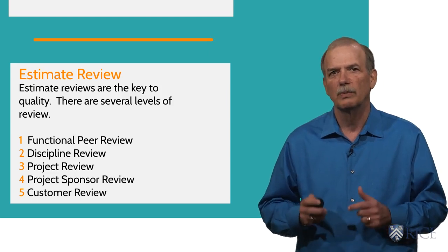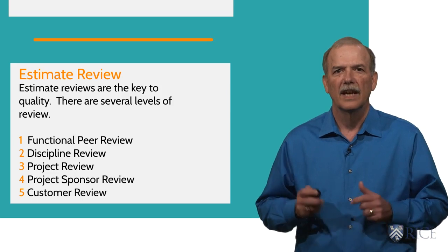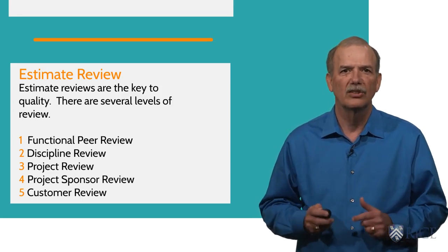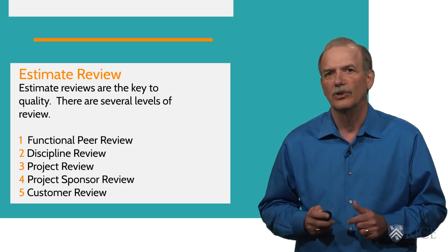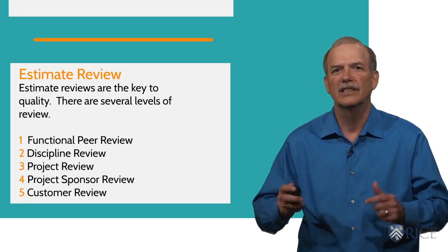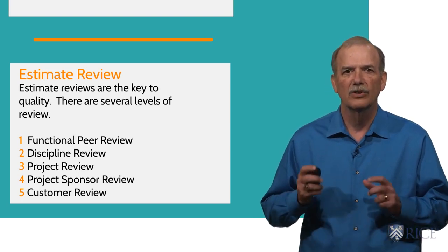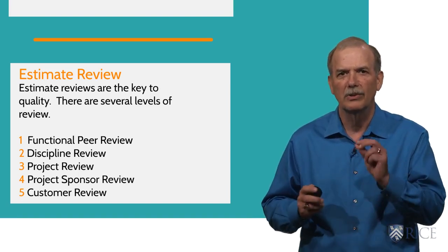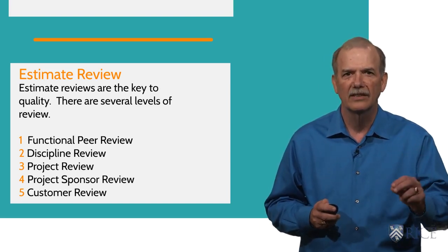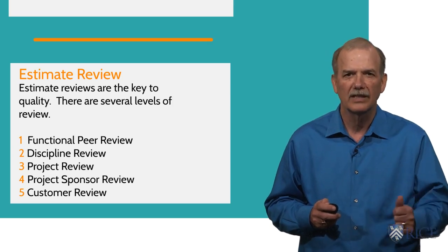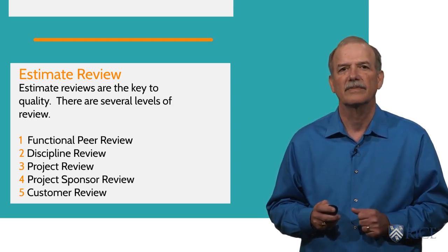Good reviews will spend the bulk of the time reviewing the basis of estimate. Estimate reviews should focus on the techniques used to develop the estimate and whether they are appropriate for the goal you're trying to reach. Are they consistent with the organization's standards? They should focus on how you develop individual components of the estimate. Are they repeatable? Did you use good methods to quantify the estimate? Is the pricing appropriate? Did you consider the right factors in the estimate?